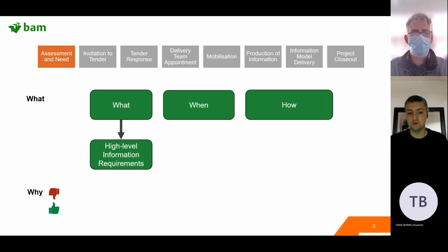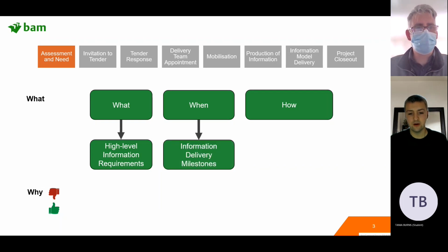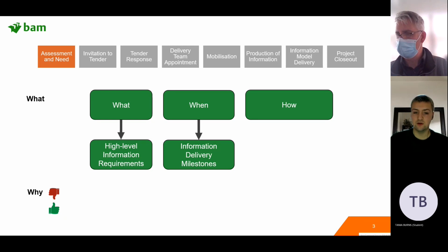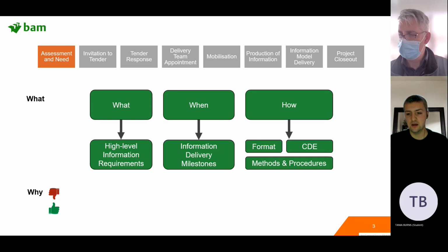So they're starting to think about what they should be requiring, what's going to be useful to them, and when that should be delivered. So that's throughout a project. A client is within their rights to say, I want this information at this stage. So maybe before the construction has begun, they get a handover of information. During construction, you normally don't, and then at the end there's a handover date.